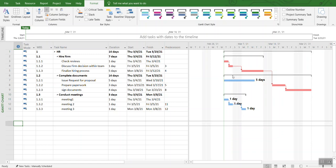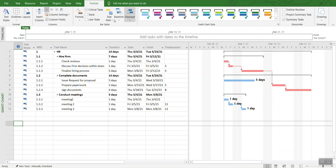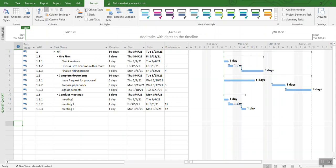Now we have the duration, but as you can notice, the issue is that we do not see the duration for the critical path. The only thing you need to do to fix that is go back to Format, uncheck the critical task box, and then check it again. Now you can see the critical path with duration displayed.